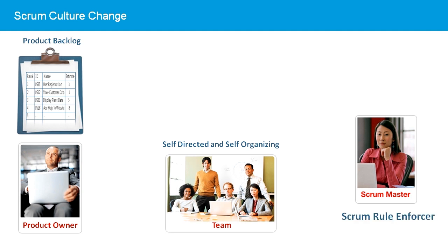The Scrum Master is a new servant leader role, critical to the success of the Scrum project, but not given any authority. The Scrum Master owns the Scrum process and ensures it is implemented correctly. They also work with the team, helping them to be productive, facilitating teamwork and removing impediments blocking their progress. However, they cannot direct the team, other than telling them when they are not following the Scrum rules, values, and processes.